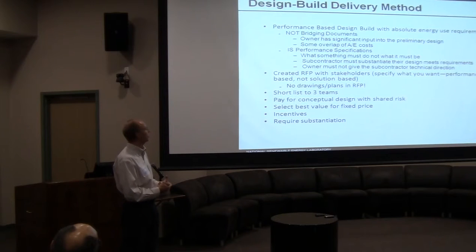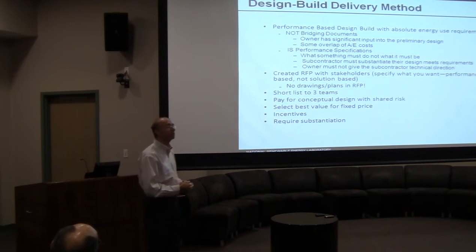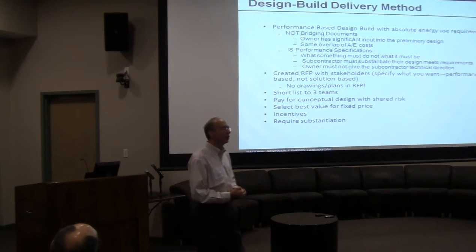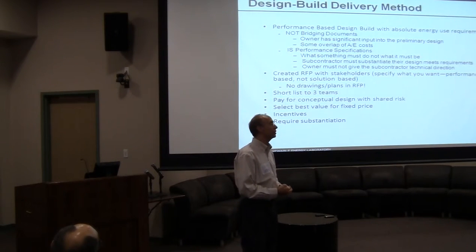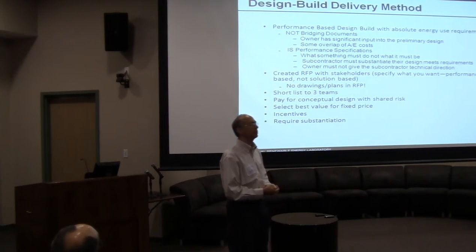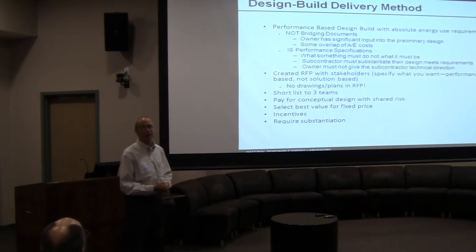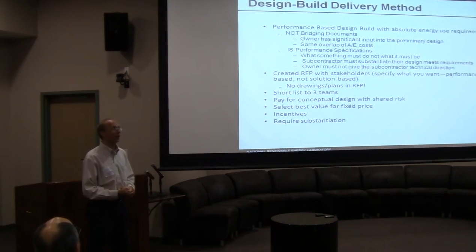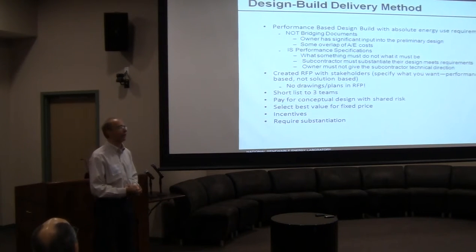There was a merit system point. We picked 3. And we paid for those, and we actually required them to do conceptual designs at that point. And we were willing to pay the losers. The winner got rewarded by getting the contract.